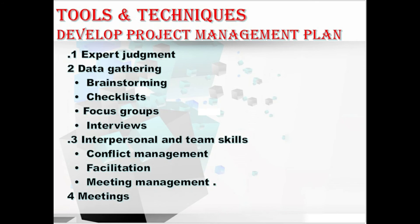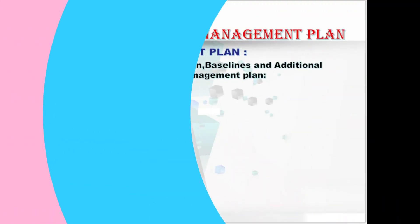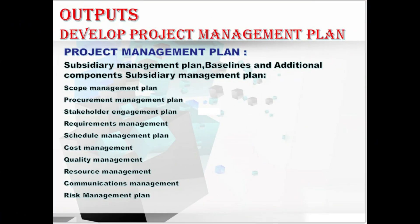Let's move to its outputs. In outputs we have only one output: the project management plan. The project management plan is the document that describes how the project will be executed, monitored, controlled, and closed. It integrates and consolidates all the subsidiary management plans and baselines and the other information necessary to manage the project. The project management plan components include the subsidiary management plans, baselines, and additional components.